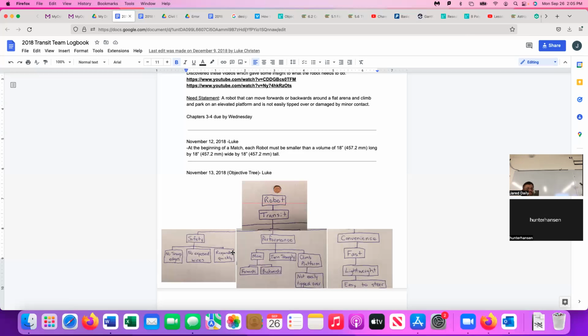Okay. Did you say that there should be a to-do list in there too? Yeah, so the task list is what you build your Gantt chart from. All those things that I mentioned are all things that would be on your task list. Okay. So those two things contain the same information, but the task list is just a list of things with times, and the Gantt chart organizes that list into kind of a schedule. All right. Yeah, that sounds good.